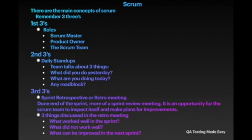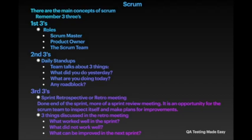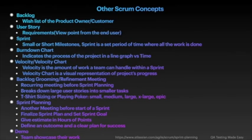Daily standups should not be more than 15 minutes for the entire team. Each person should be brief — just give a status update and move on. The third three: sprint retrospective, or retro meeting. Retros are done at the end of the sprint. It's an opportunity for the Scrum team to inspect itself and make plans for improvement. Three things discussed in the retro: what worked well in the sprint, what did not work well, and what can be improved in the next sprint.